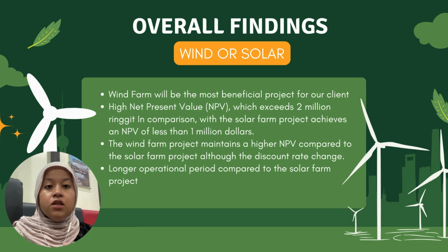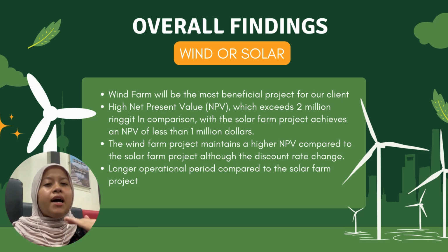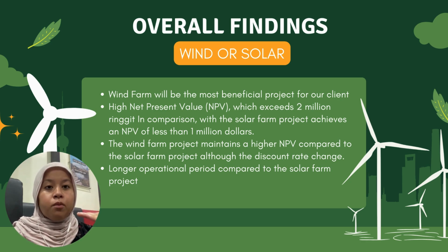The benefit of the wind farm project is further demonstrated when considering changes in the discount rate. When the discount rate is adjusted from 8% to 5%, the wind farm project maintains a higher NPV compared to the solar farm project. This sensitivity analysis underscores the resilience of the wind farm project's financial performance under varying economic conditions, reinforcing its position as a superior investment.